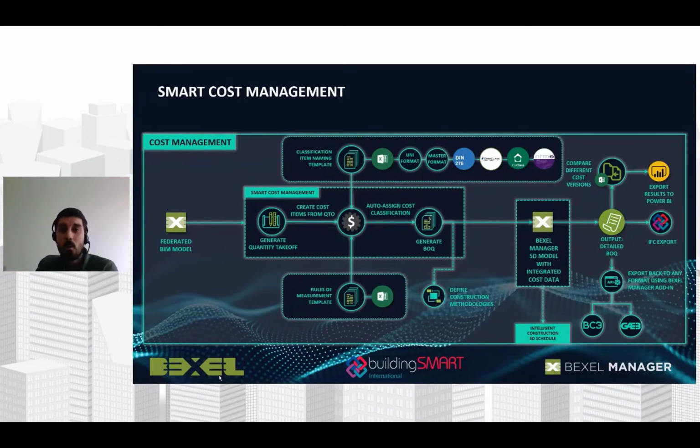To do this, again, we need proper software and a proper workflow. In Aleksandar, this could be done by generating what we call a quantity takeoff, which will represent a sort of work breakdown structure for our future cost classification. We can sort elements by, in this case, the Uniformat assembly code, make a hierarchy with headings, subheadings, and groups of works, and then, based on this work breakdown structure, create the cost classification structure.